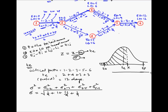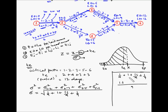Calculating with LCM = 9: (1 + 9 + 16 + 1)/9 = 27/9 = 3. So the variance for the project is 3 and 27 divided by 9 is 3. Therefore the standard deviation is √3, which is approximately 1.73.